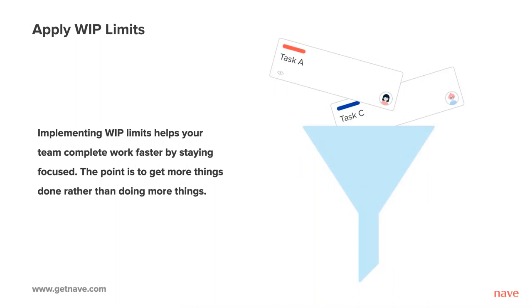Apply work-in-progress limits. Using the Kanban board alone isn't enough to support a smooth and efficient workflow — your processes can still get stuck if there is too much work in progress. Too much WIP leads to delays and your team will be forced to constantly switch context, trying to handle all work at once. Constant context switching is not effective; it's estimated to cause at least a 10% penalty per switch. Multitasking makes your team members feel busier while delivering less, leading to overburden, poor service quality, and a negative effect on team engagement. Implementing WIP limits helps your team complete work faster by staying focused. The point is to get more things done rather than doing more things.